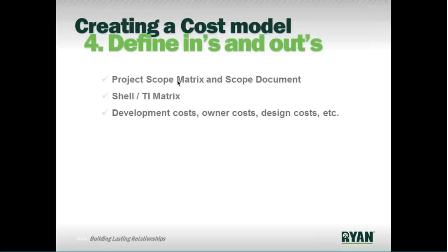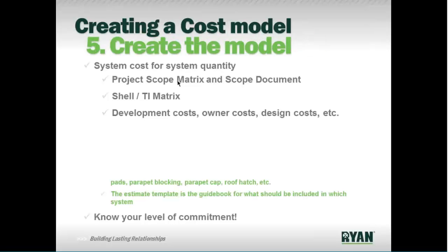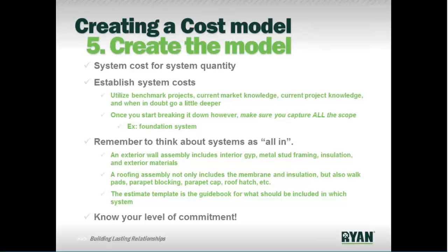Shell and TI matrix, where is the line between shell and TI? And you can use that to define for your cost model how much is being included in your shell and how much is in the TI. Development costs, owner costs, design costs, etc. All these things should be looked at and understood, whether or not you should be including them in your cost model.